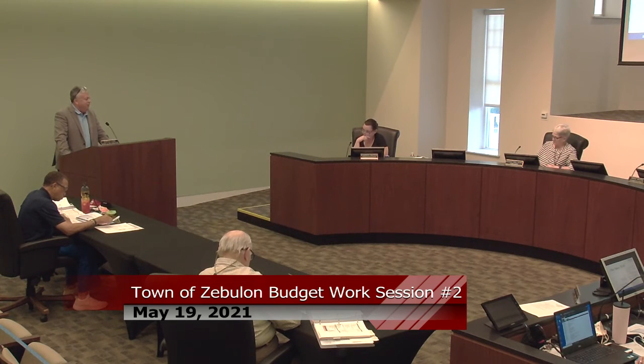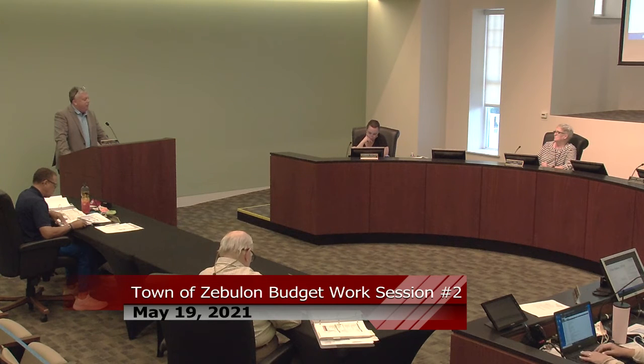Our goal is to hit these numbers. We're trying to be conservative. So with moving from electric to gas, the gas units are more expensive? It's not necessarily the gas units are more expensive. We have to put the gas piping in place. We have to pipe from the piping inside the building and run it along to where these units are and connect to those. I wouldn't say a gas unit was more expensive than electric. It's just the gas piping that we have to do to fire these units.